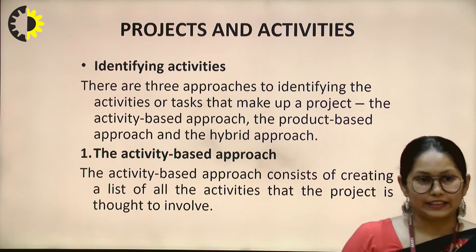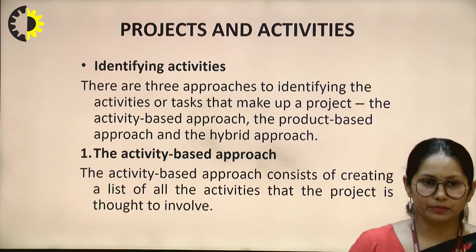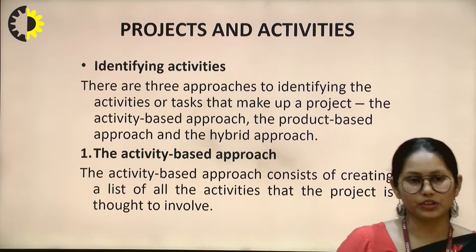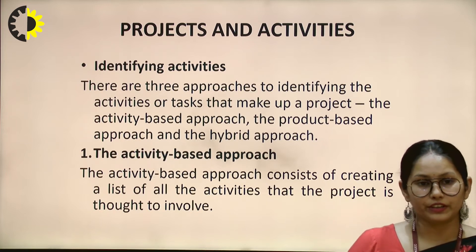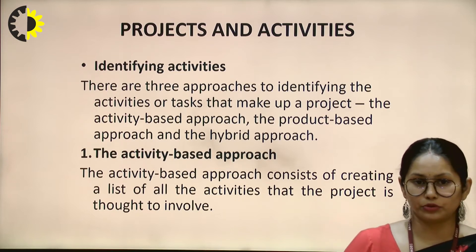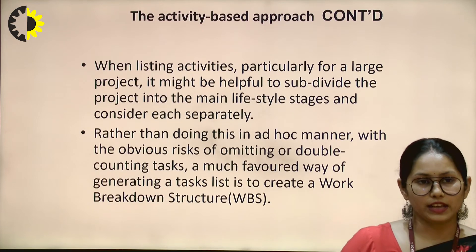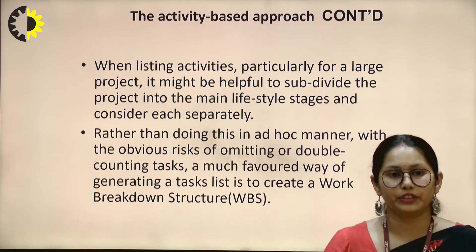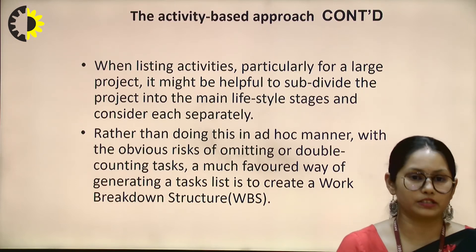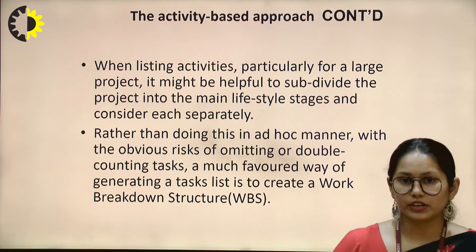There are three approaches to identify activities that make up a project. The first is the activity-based approach, the second is the product-based approach, and the third is the hybrid approach. The activity-based approach creates a list of all activities that the project involves throughout. For large projects, it is helpful to divide the project into different stages, where each main stage is considered separately and there is no dependency from one activity to another.